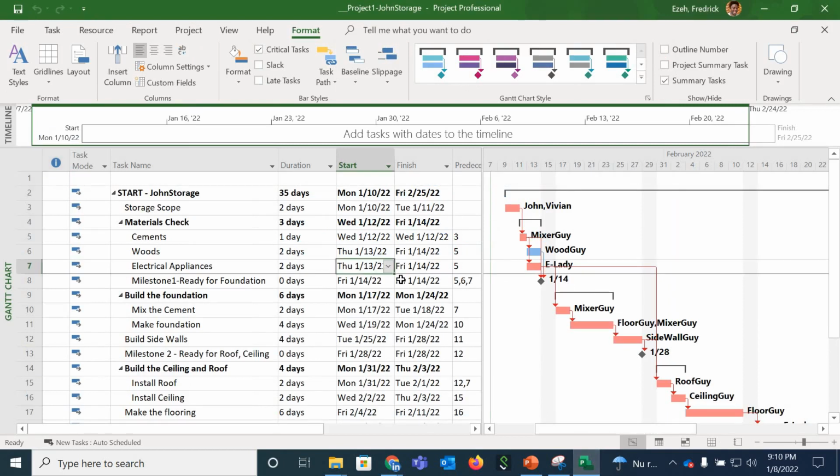And here we saw that we did something about looking at the critical path in the last video, so we will switch those critical parts on. But again, just as a reminder, when you make a plan and you check for the critical path, if you have a lot of them, figure out what you want to do, because that's a lot of risk in a plan. So to switch this on, we go to Format and Critical, and then that shows up.